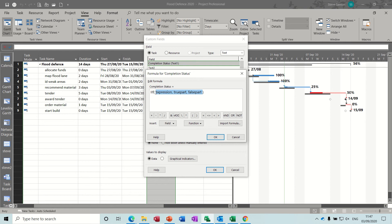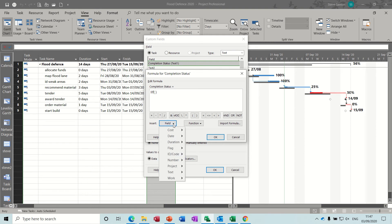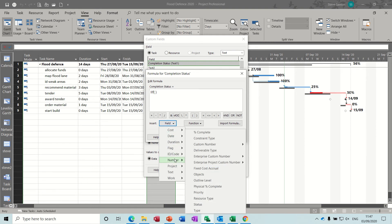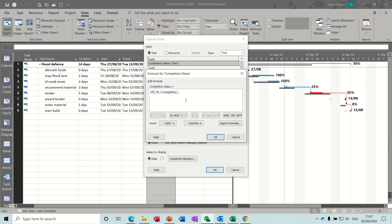The one we're going to create is going to be slightly more complicated than that. I'm going to get rid of all of that and what I want to use as my trigger for the if statement is the percentage complete column, which is under number — percentage complete. So if the percentage complete equals 100, that means it's finished — comma — I want it to return a number 1.